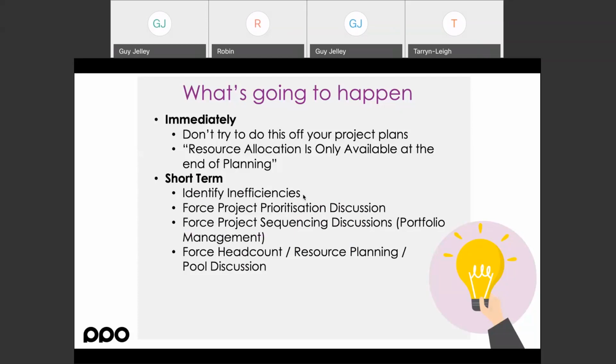And then what will typically happen is a headcount discussion. Do we have enough resources for this? Most PMO managers and executives that I meet who are accountable for the PMO say the executives want us to execute on this portfolio of 40 projects, but we actually only have enough capacity to do probably 30. So there's really a decision point: more resources or fewer projects, one of the two. That conversation will pop up, and then you'll have to make those decisions as to how you do this.